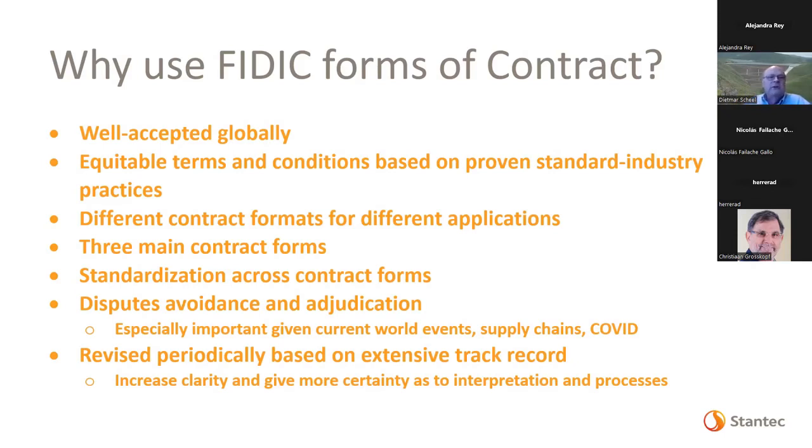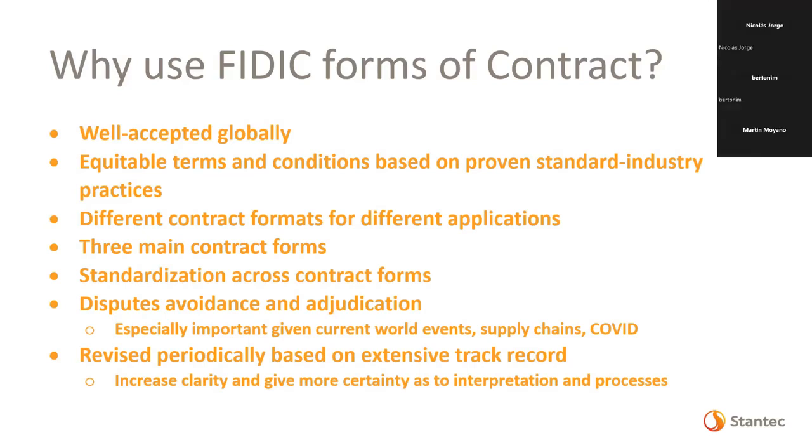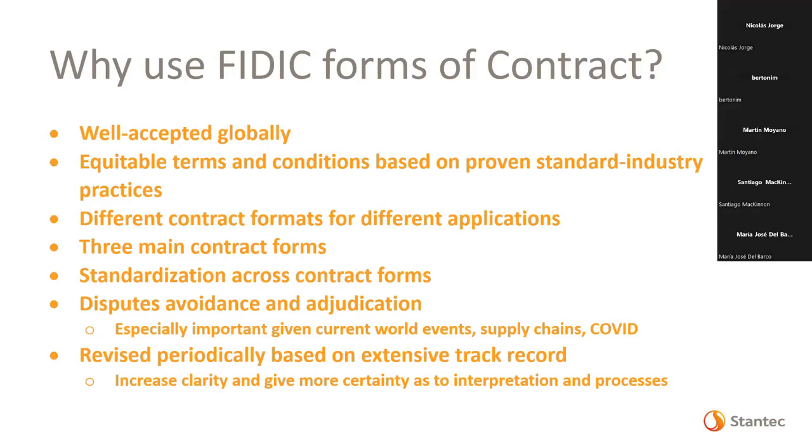Christian will later get on to disputes avoidance and adjudication. And in being equitable, it talks about processes, FIDIC does, how to resolve issues. It becomes a cookbook of sorts. People have certain deadlines to make decisions in, for example. So it helps coach you through that process, and disputes are natural. You're going to run into them in every project.